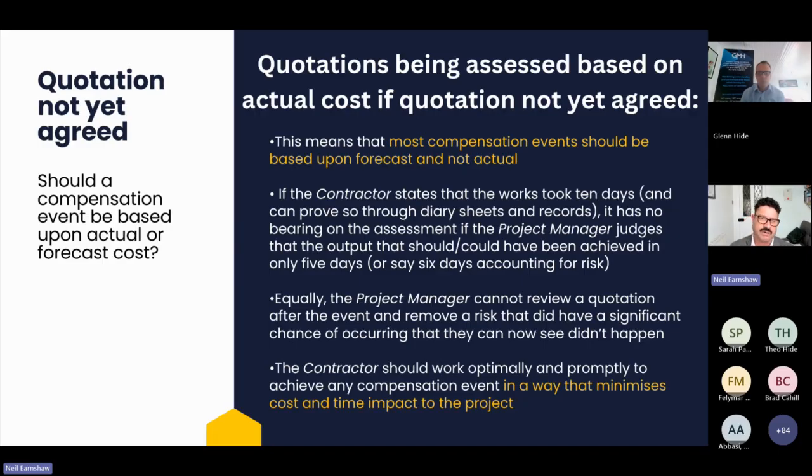And yeah, we shouldn't be reviewing quotations after the effect, but we do see this happening where it feels like what happens is if we just let time pass and we know how long it took, then we can cherry pick. We can pick the quote more favourable to the client, whether that's based on the forecast or whether it's based on the actual, but that's really detrimental behaviour to the relationship.